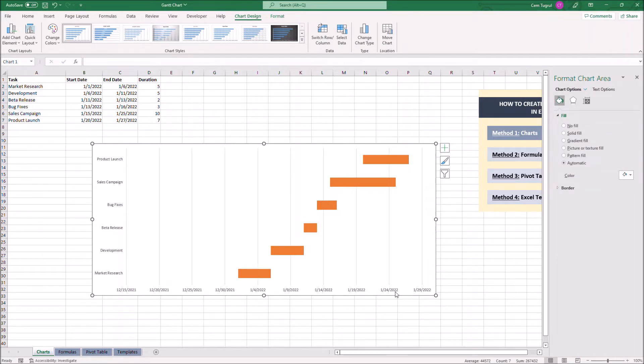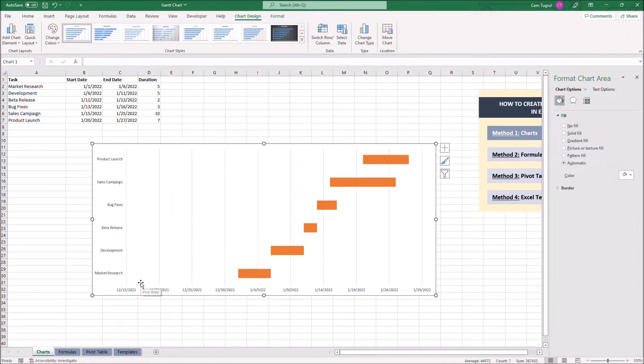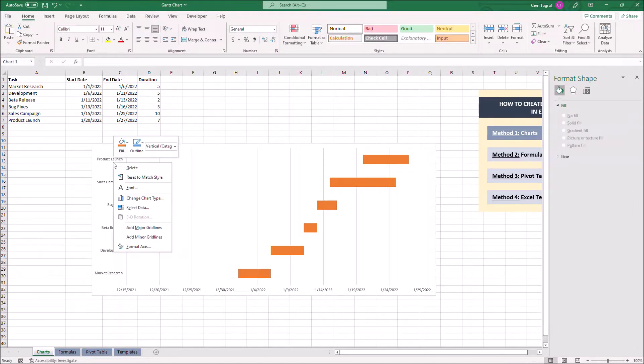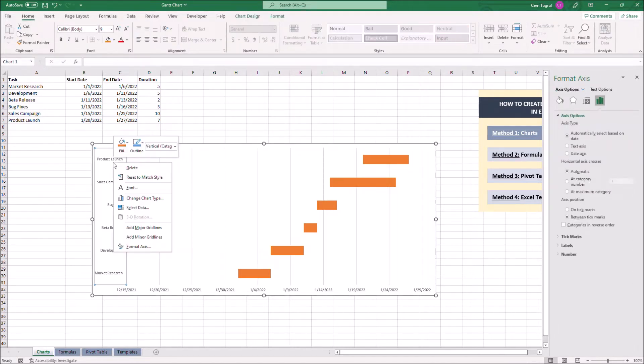Next, we want to flip these tasks as they are not in correct order. As you see, our first task is market research, and here is the last one. Let's right-click on the task and select categories in reverse order.